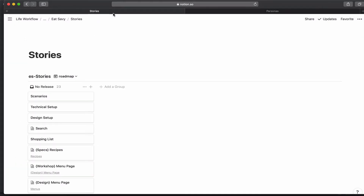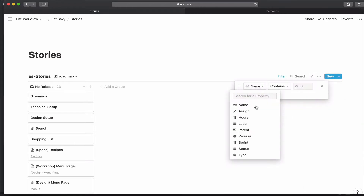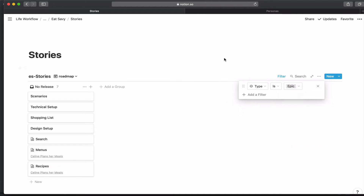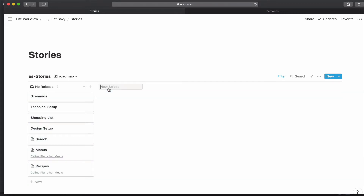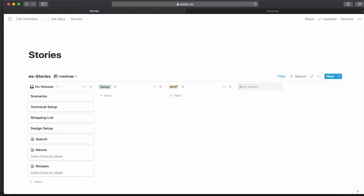Let's go back to the stories. I'm going to filter this so that I'm only seeing the epic types, which also makes it easier to see our list. I want to create a couple of releases. The first one I'm going to call setup — it's all the work we're going to do before we have something we can build. Sometimes there's a pre-MVP release where things are somewhat functional and a beta group comes in. But I'm just going to do setup, MVP, and release one.